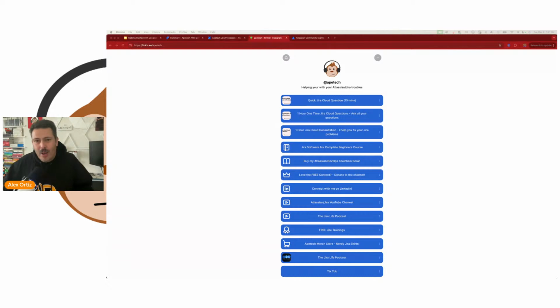I can't tell you how many times a bug has been created and assigned to the developer, and one of two things happens. One, it wasn't really a bug. The person testing didn't understand the requirement, and now you've just wasted the developer's time. Or two, the developer says, this works on my machine, so I don't know why it's not working in your environment. And so we have bad DevOps practices.